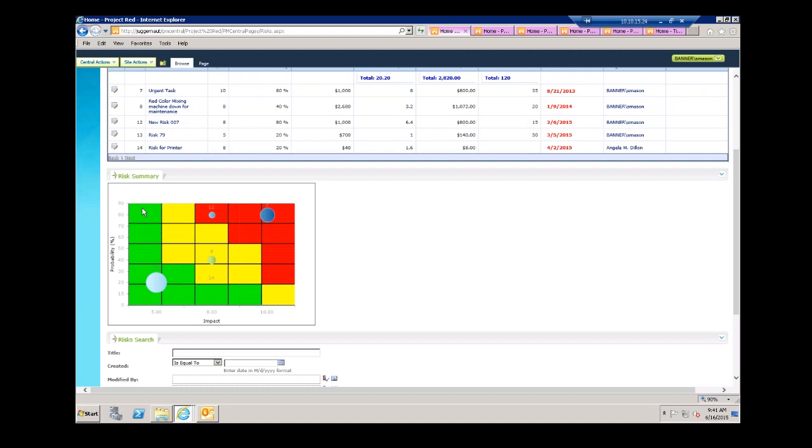So let's reverse that scenario a little bit. Let's take a new risk, the impact pretty high, 10 or 11. Okay, probability percent maybe not as high. Let's say it's 30 to 40%. Well, regardless, it's falling in the red quadrant of the chart. And here again, regardless of the cost expenditure, it's going to fall in the red area of the chart again. So with that being said, that particular risk, much like the ones you see here and here, those are going to be ones you want to monitor because they're definitely going to impede the progression of the project and create a significant deadline.